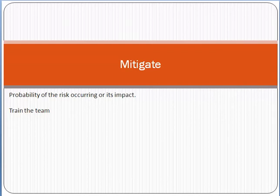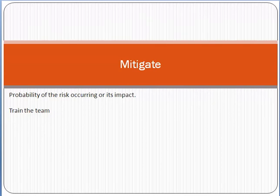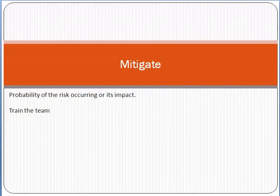Mitigate means you try to decrease the probability of the risk occurring or reduce its impact. For example, if you started a new e-commerce project and you know your team is not capable enough on a particular technology, you arrange training for the team on that technology so that after training they will be capable enough to handle it. Mitigation means decreasing the likelihood or chances of occurrence of the risk.